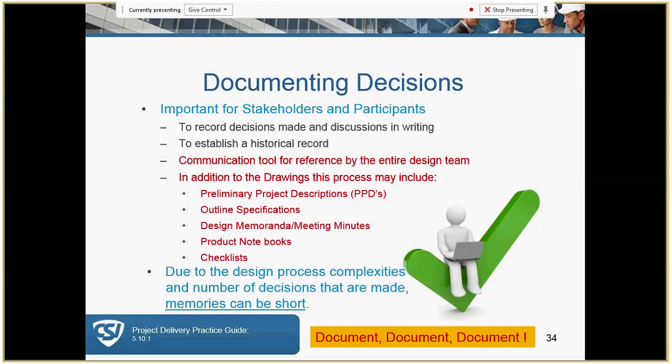Suchi, just to chime in on that too, what we're seeing is the basis of designs, especially on projects that will have commissioning requirements later on, to document any of those changes. A simple change that you think in the wall system could definitely throw off a lot of items in LEED.